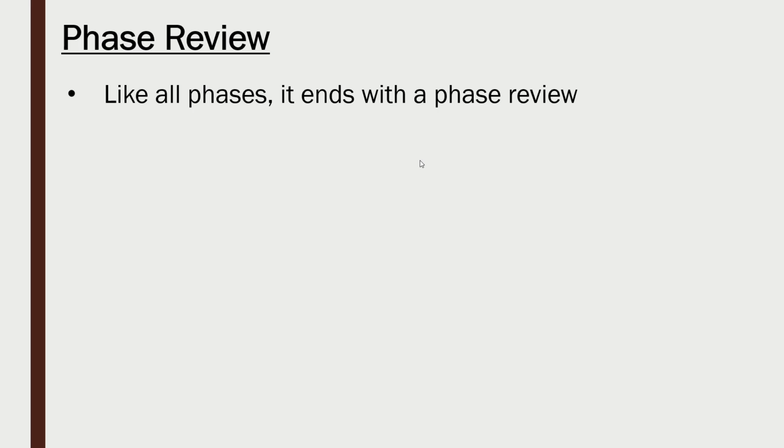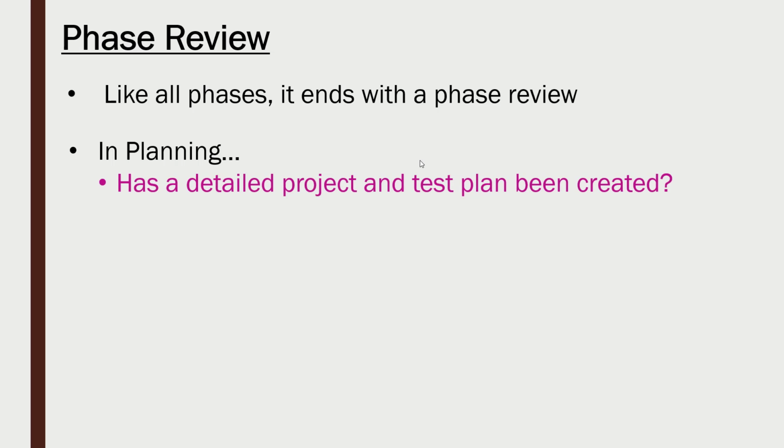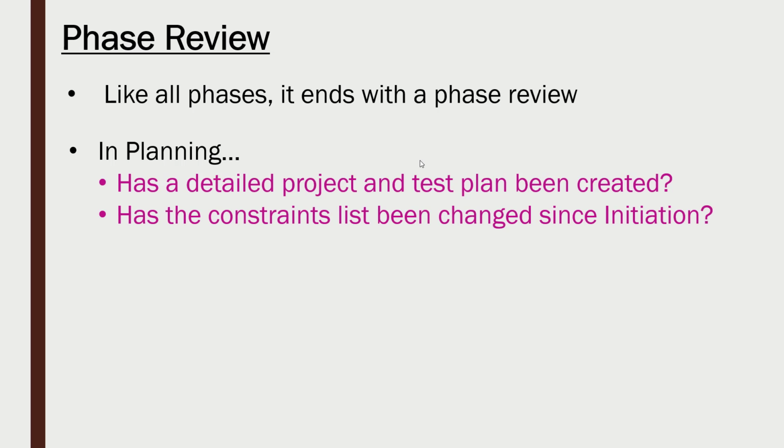And our final task to do during planning is a phase review. Like all phases, we have a phase review, looking back to see what we did well, what we did badly, maybe we need to go back and change something before we move on. So the sort of questions you'll ask at this meeting will be, have I got a detailed project and test plan? Have I made it detailed enough? Can I follow it directly in execution?